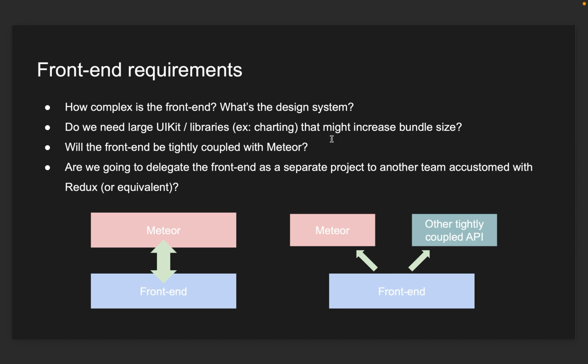And also, we need to understand whether in our project the front end will be coupled to Meteor or not. Because if the front end can be uncoupled from Meteor, maybe it's easier to delegate the front end project or projects to another team or different teams that will do just a simple front-end app. For example, with React, they will do a create React app, Redux app. We will provide the APIs, whether they are RESTful or PubSub or DDP APIs, and these teams can then take a certain part of the work, and we will focus on the Meteor work.